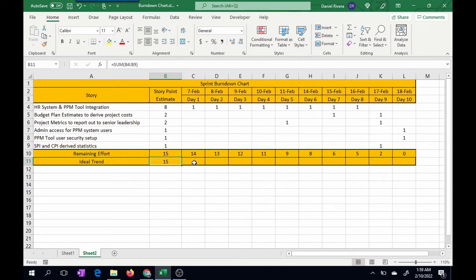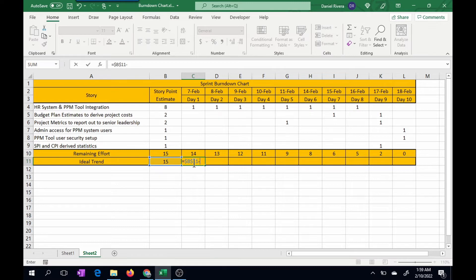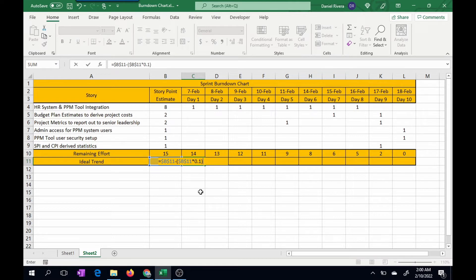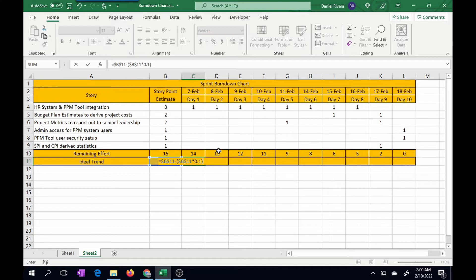So in that way, you can tell whether you're ahead or behind of schedule. So what I'm going to do is take the absolute reference of cell B11. And I'm going to take away a tenth. So I'm going to multiply that by 0.1. If you can see here on the cell line, I'm taking cell B11 times 0.1 because we want to get one-tenth of the 15 since it's day one. And then in this cell, we're going to get two-tenths of 15, and et cetera. So when I hit enter, I get the 13.5.